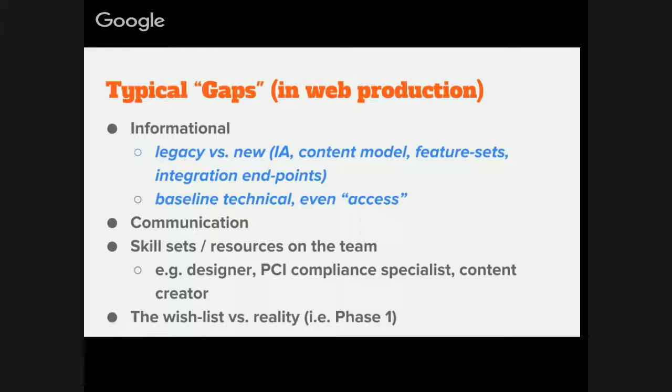So it's really great to have that understood and documented. There are also baseline technical questions that are part of a gap analysis. Great, we're going to redesign this website, it's going to be awesome. Where is it hosted? Oh, we forgot to ask that. How could you forget to ask that? It's the most obvious thing in the world. Well, you'd be amazed at how often that gets forgotten, let alone what the access credentials are and what protocol you as a firm have for communicating secure information. There are no standards across the industry. We as an agency are always pushing for those standards and protocols and good coverage of those routine things, but they're not a given.